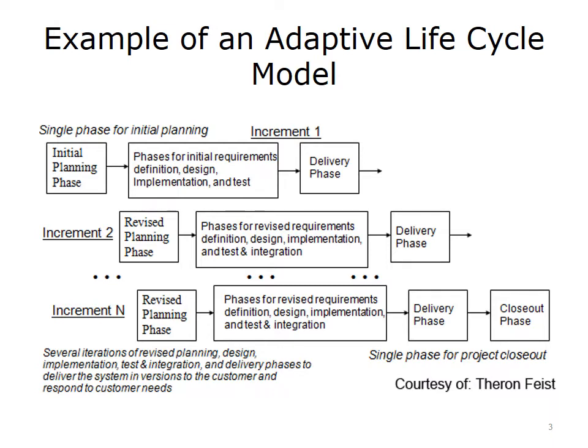Parallel to your development effort, you will typically have ongoing discussions with the customer and the user community, so that together you learn more about what is desired in the system. As users work with the first developed release, you will learn even more information. All this additional information contributes to the revised planning sessions that will define later releases. Again, the key characteristic is that you can only develop an initial plan for an initial delivery. The later planning will be keyed to what you learn from the user and customer communities and other stakeholders.